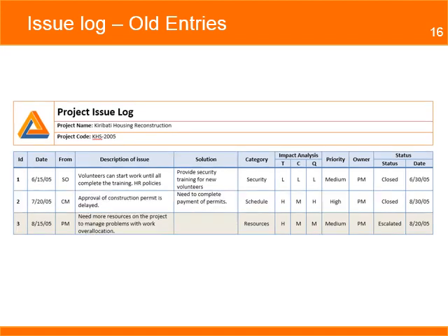The third and last issue in the log was reported by the project manager and deals with the over-allocation problems with the team, problems you are familiar with. This issue was given a medium priority and was escalated to the program director to approve the hiring of additional staff to help with the work. You know from a previous conversation with the program director that the request was not approved, but the changes you made in how the work is assigned have helped solve this issue.